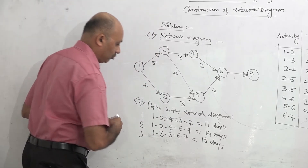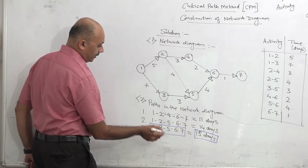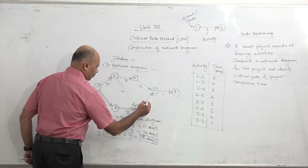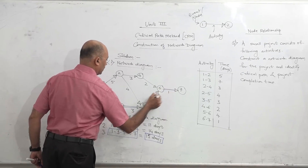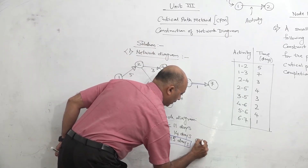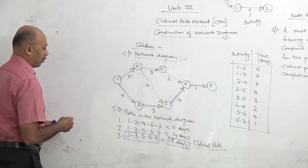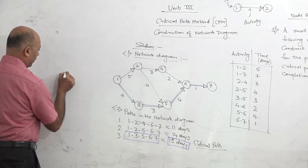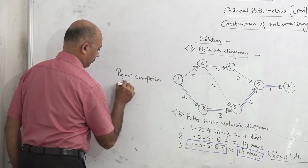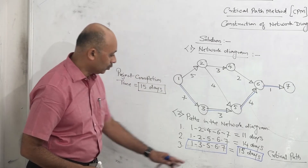The longest path is 15 days, and we highlight it with a double line: 1-3, then 3-5, then 5-6, and 6-7. This path is called the critical path. The meaning of critical path is that it is the longest path in the network. The project completion time is also equal to our critical path — so project completion time is equal to 15 days.